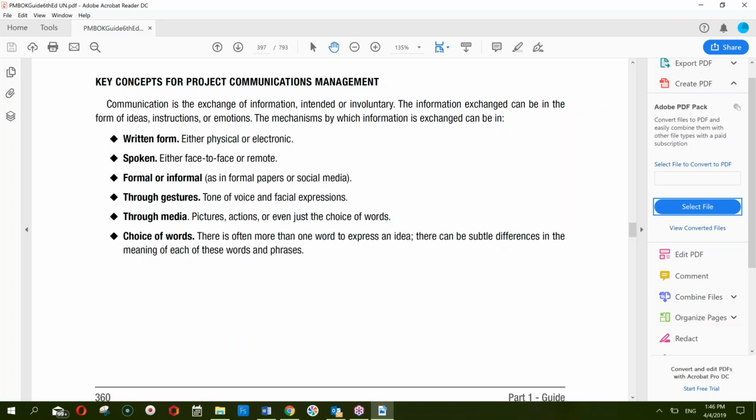Yes. Okay. So I will give you a formula for that, which is a summarization of that factorial thing. That is the number of stakeholders, n, multiplied by one less than the number of stakeholders, n minus 1. Right? Okay.